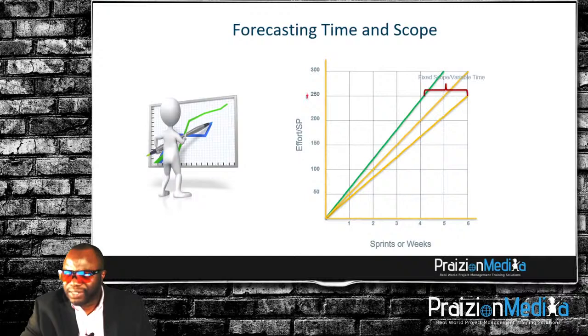But the ultimate goal of this is to understand what you could possibly give to a stakeholder within weeks, or what number of story points you should aim to get done for a stakeholder based on request. So a stakeholder asking for 250 story points worth of work, from this velocity chart, you've got an idea of how to bargain with that stakeholder, right?